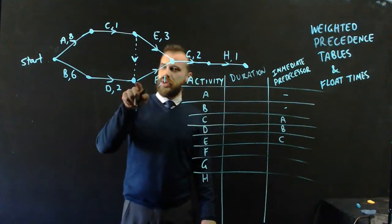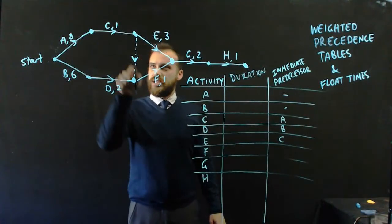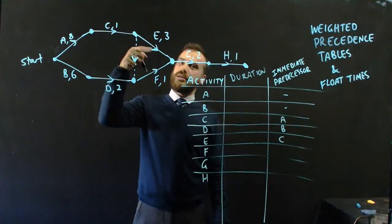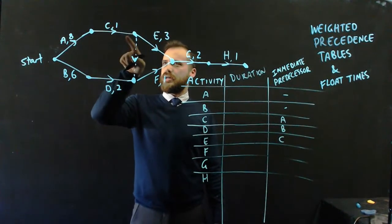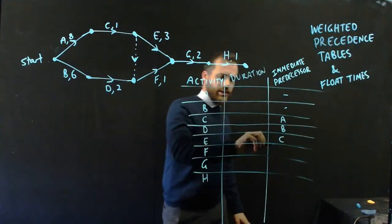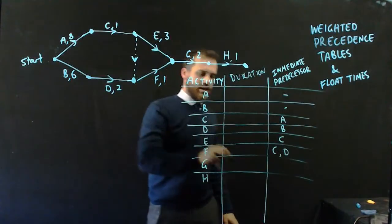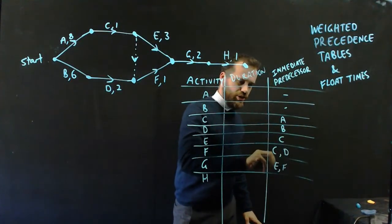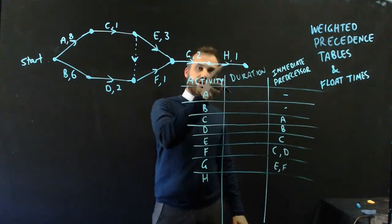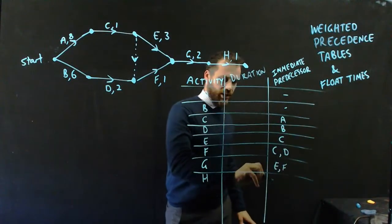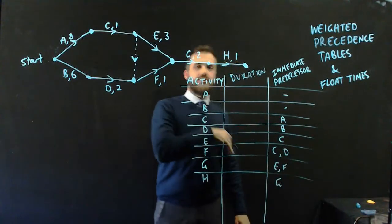E has an immediate predecessor of C. F, you need to be careful with, has an immediate predecessor of D, but the dummy activity also shows that it has a predecessor of C. So that's C and D. G has two predecessors, E and F, and H has a predecessor of G. And we're finished.